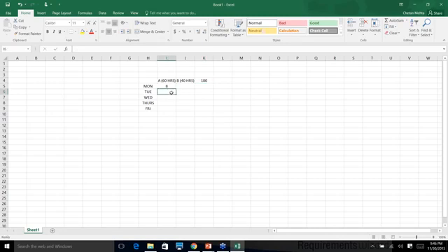Now how much can you get in one day? You cannot get more than 8 hours, right? I would basically say 6 hours. In the real world, you cannot work 8 hours, right? So I got 30 and 30 here. So I got 60 hours total. You see what I'm doing here?